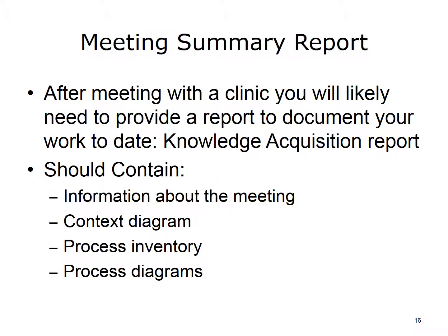After meeting with the clinic, you will likely need to provide a report to document your work to date. The knowledge acquisition report should contain information about the meeting, including dates, participants, along with processes documented on each date, context diagram, process inventory, and process diagrams.